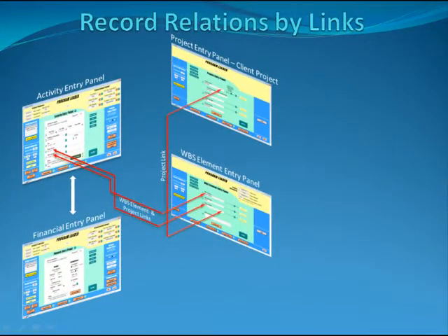When a WBS element is entered in the activity panel, it links it and the project name to a WBS record having those names. Why does it link with the two names? This is so a WBS record named Financial on Project X, for example, does not get confused or aggregated with a WBS record named Financial on Project Y. So when you run a report on a WBS element, only the activities of this element from a given project will report. Program Leader also allows a WBS element name to report activities spanning all projects. But the segregation behavior is what you would want to make happen if you wrote this software.